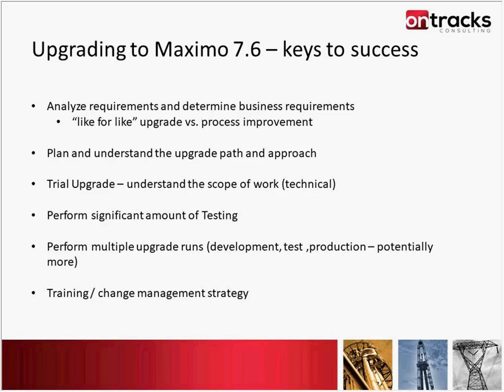Perform multiple upgrade runs. So you're going to want to upgrade multiple times depending on how many environments you have. So if you've got three environments, development, test, production, obviously you're going to want to run the upgrade before production. You want to upgrade at least twice. So if you're running into additional errors, maybe on your second run, and you've had to change the approach, you may need to add an additional upgrade run.